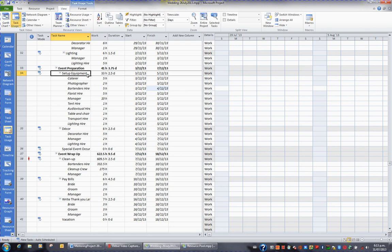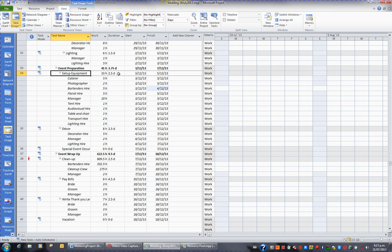At a task level, it tells me 33 man hours, and that 33 man hours is then broken down into the various resources and how many man hours they're contributing towards this task, and the task is taking two and a half days.